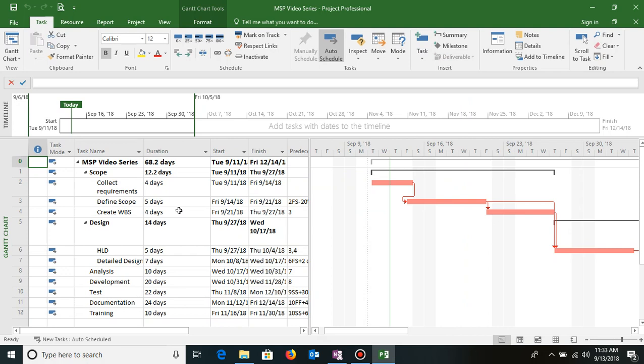So, milestones are generally used by the project manager to properly monitor and track, because it's impossible to track and monitor all the activities in a project, as activities might go into the thousands. So it's impossible to actually track each and every activity. So project managers generally create milestones in their project at the appropriate places and track those milestones.